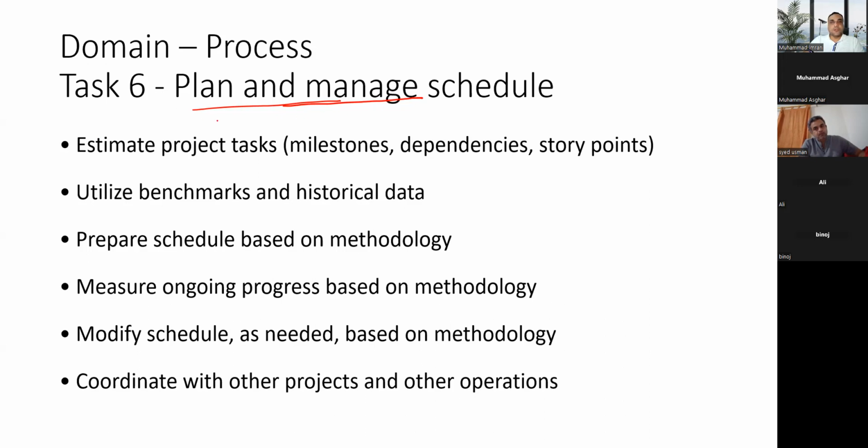Similar to that, we have something called float. Float means the amount of time you can delay an activity without delaying the project end date. And free float is the amount of time you can delay an activity without delaying the start of the next activity.